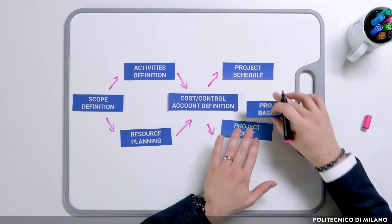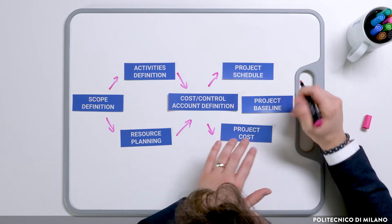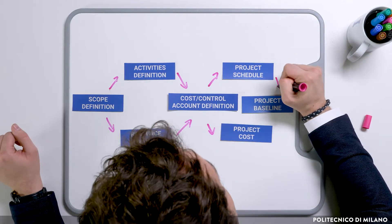With all this information, we can define the project baseline. The project baseline is the tool that brings all this information together, creating a baseline to control the execution of the project. It represents the starting point of the Earned Value Management System, also known as EVMS.